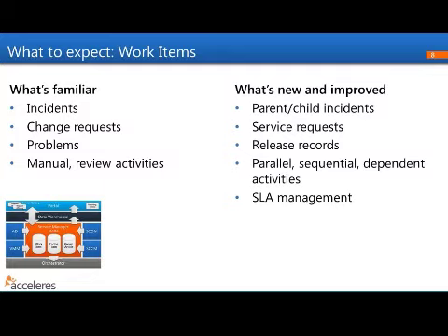Activities, as I think I mentioned on the previous slide, you'll be able to do a lot more with. You're still going to have your manual activities. You'll still have your review activities. You'll now have these parallel and sequential activities. And as the names suggest, parallel will mean you can complete the activities in parallel. Sequential will mean that there is a dependency there: you complete the first, then you complete the second.